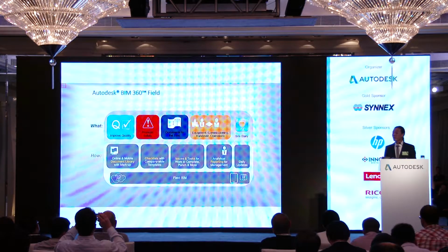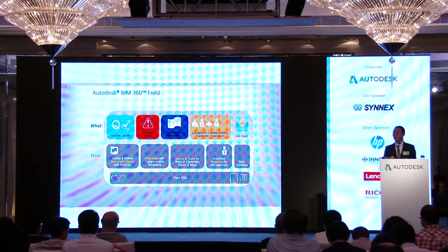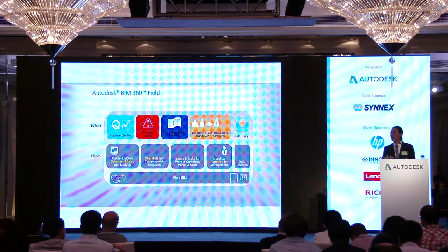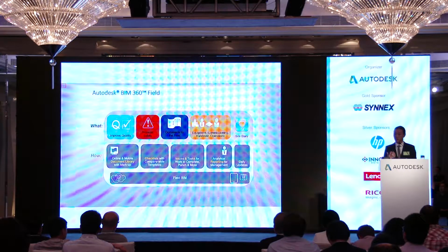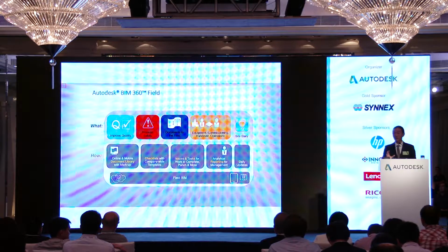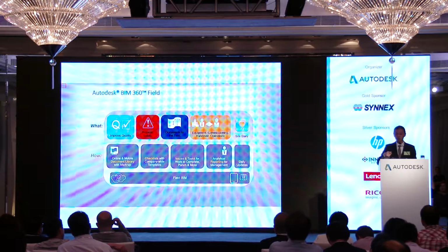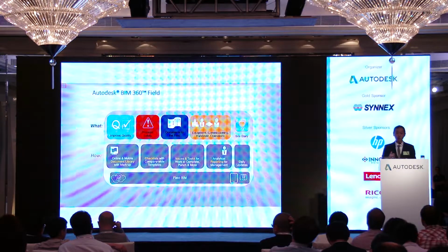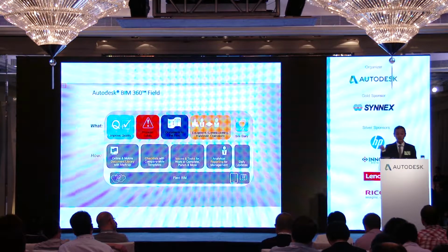And we have implemented BIM 360 Field in a private job in Tseung Kwan O, a data center, and the client tends to use 360 Field for QA, QC. After the main contractor builds what they're supposed to build, if the client finds it is not up to standard, they will take a photo in 360 Field and Glue it back up to the main contractor. The main contractor will review, rework what they have done, and take a photo and send it back to Field. The client will see that it's been solved, and they can sign it off on 360 Field on the iPad as an approval.